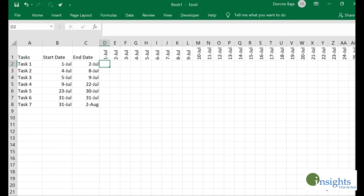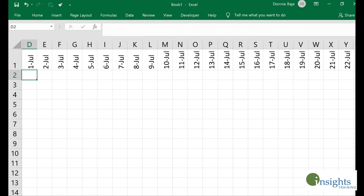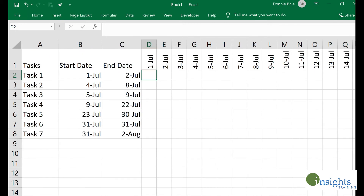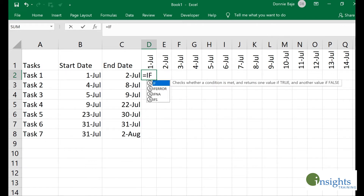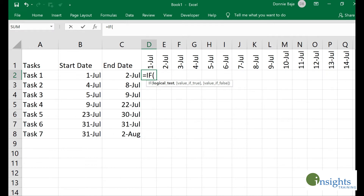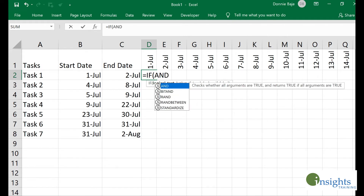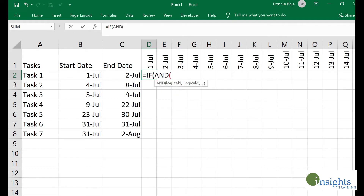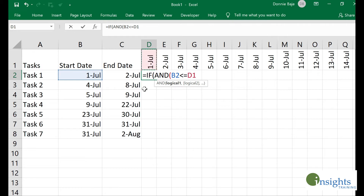Next, I will use an IF statement to mark the cells that should be plotted with a certain color. I'll use IF, and then since I have to check two conditions, I'll use the AND function. I have to check if the start date is less than or equal to the date shown in that column's header.